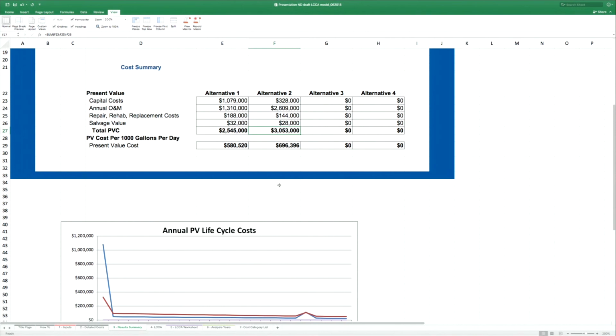When we think about asset management and O&M, some of those factors get built into our operations and maintenance in terms of an expected value of maintenance and associated repairs, like a minor earthquake occurring that might require annual crack repairs, or going out and doing inspections on pipes to perhaps do additional replacements.